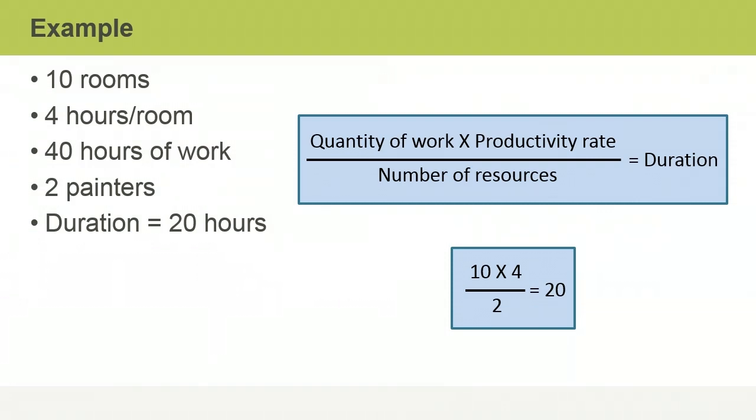I should point out that some activities' durations are not affected by the amount of labor assigned to them. For example, downloading data from a single server with a fixed download rate will take the same amount of time, regardless of how many people are doing it.